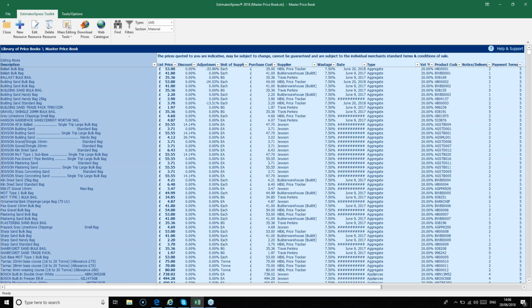And plus, as I mentioned at the outset about creating your own price book, you'll then have to manually manage their prices. So only create a new resource when it's for something that does not already exist in the price book. Otherwise, you're just creating more work for yourself.